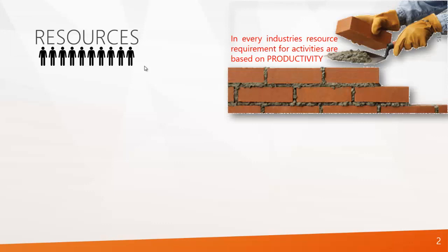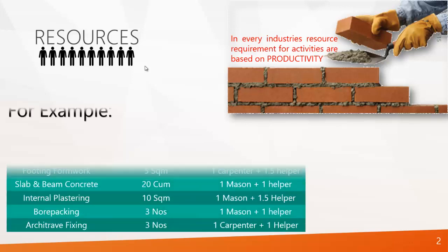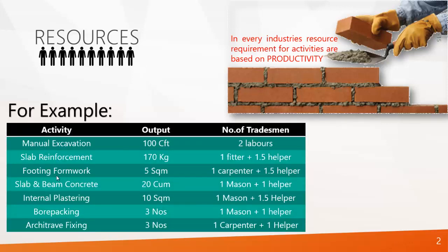In every industry, resource requirements for activities are based on productivity. Here is an example from my experience. For an activity of manual excavation, to do 100 cubic feet, you require 2 laborers. Similarly, to do 170 kg of slab reinforcement, you require 1 fitter and 1.5 helpers.